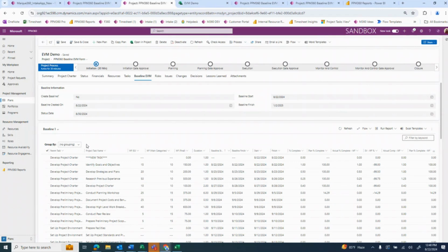And you can even create multiple baseline views after you set it. For example, I want a cost baseline view that shows me cost related fields, and then an effort related baseline that shows me more of the effort completed, effort remaining. And you can even go into what resources were assigned at a specific point in time as well, and if that changed as well.